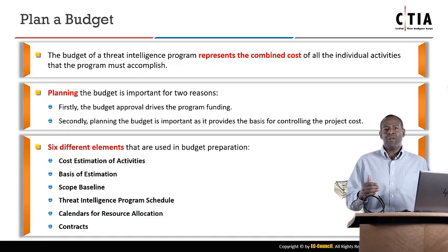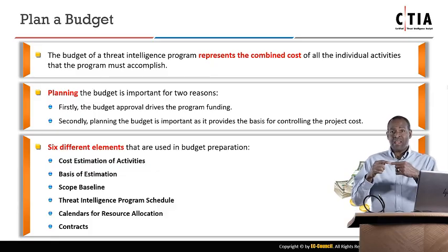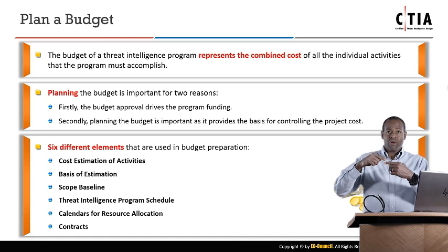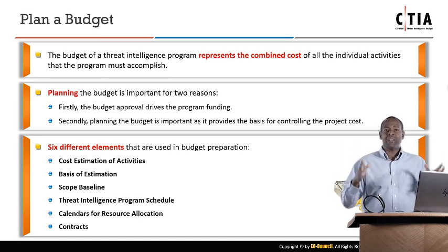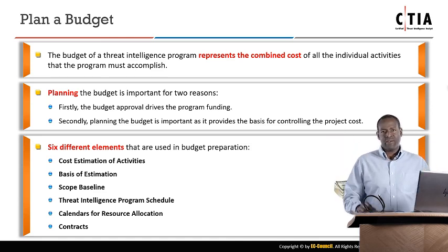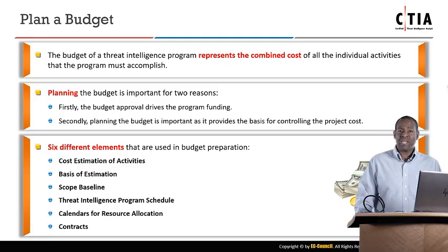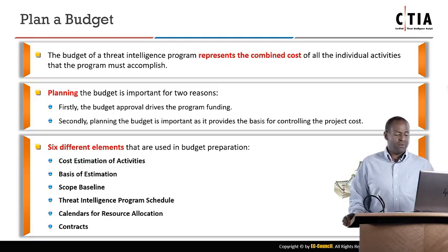And so I tell my boss, hey, you know what? I'm going to take 2 extra days off in December because Aunt Mildred is in town. And so I add that to my schedule. What should happen immediately is that should trigger any other schedules that depend on my schedule to update. If there is no automation for that, then one of the project management staff on the team needs to do that manually and update those resources. So those calendars need to be updated.